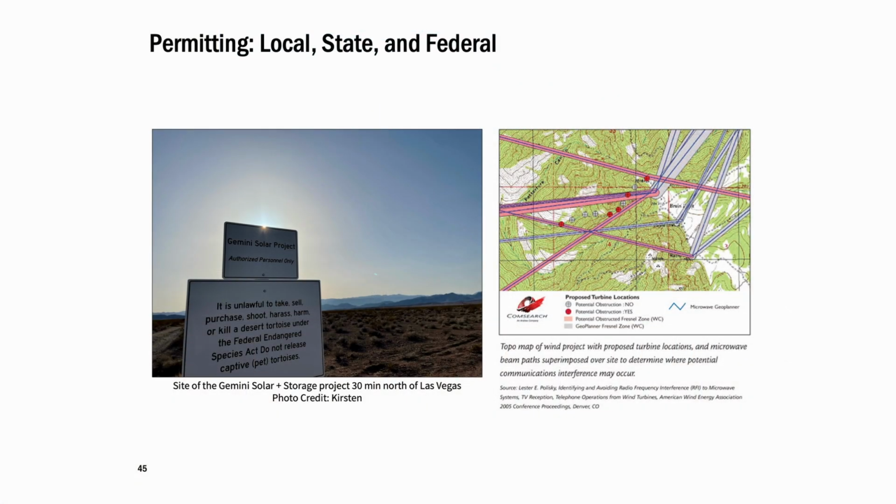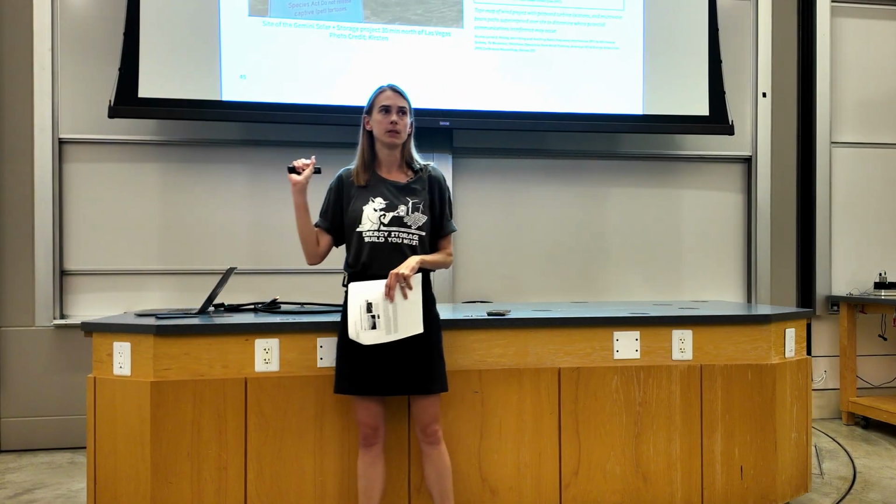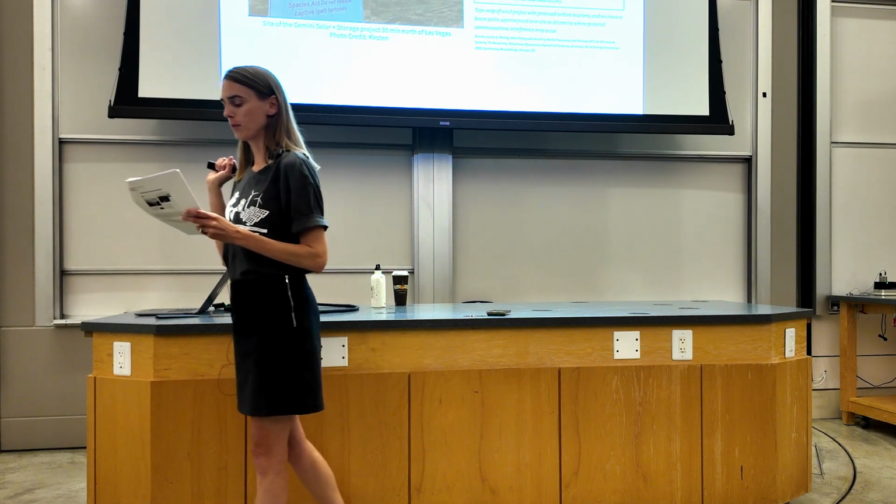But to give two examples here, a big consideration for wind energy projects is whether your turbines might interfere with FAA communications and radar infrastructure. So all wind energy projects need to register their turbines and get permits from the FAA. All projects, at least utility scale, also need to conduct an environmental impact assessment as part of their local permitting process. And to give an example of the permitting hurdles that might come up,